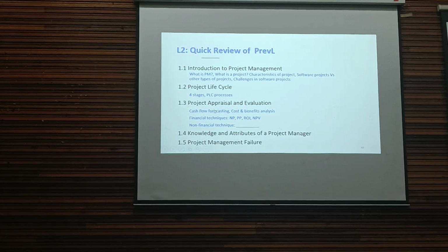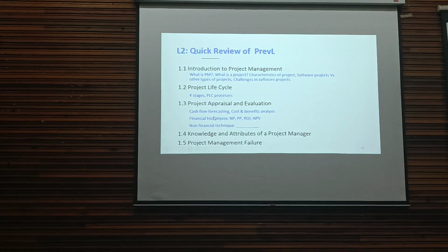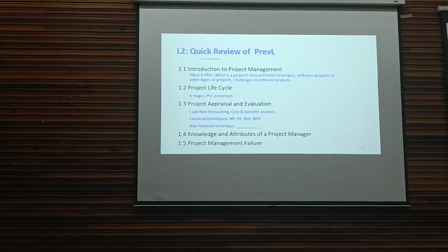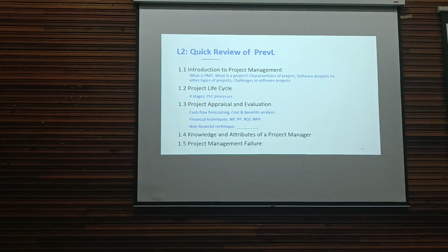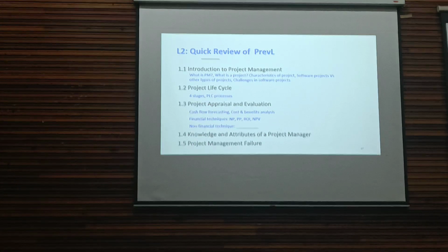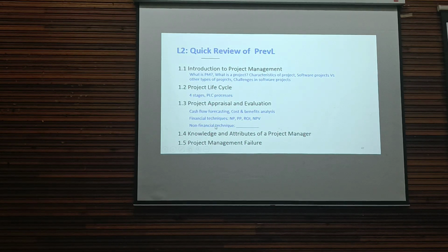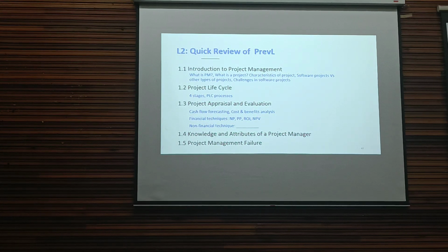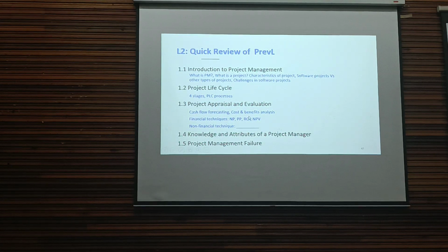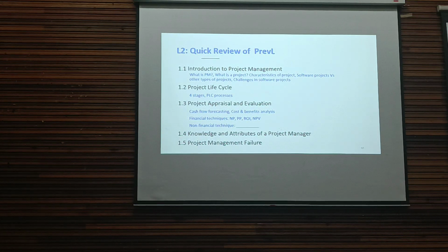Project appraisal and evaluation. You need to do cash flow forecasting. Cash flow forecasting gives you an idea when you have to spend money and when you start getting income. And at the end, there's also a small cost where you have to spend to remove the system from operation. Cost and benefit analysis: you may have several projects, but you cannot do all of them.